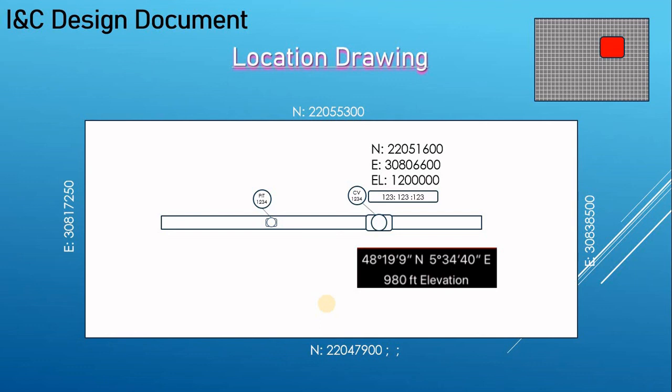So for each location, you look at how many modules and how many steel structures you have, and say, I will have 1 here, 2 there, 4 for each, let's say, boiler. In this area, the control system, I don't have anything. That is how you can roughly estimate how many location drawings you are going to produce.